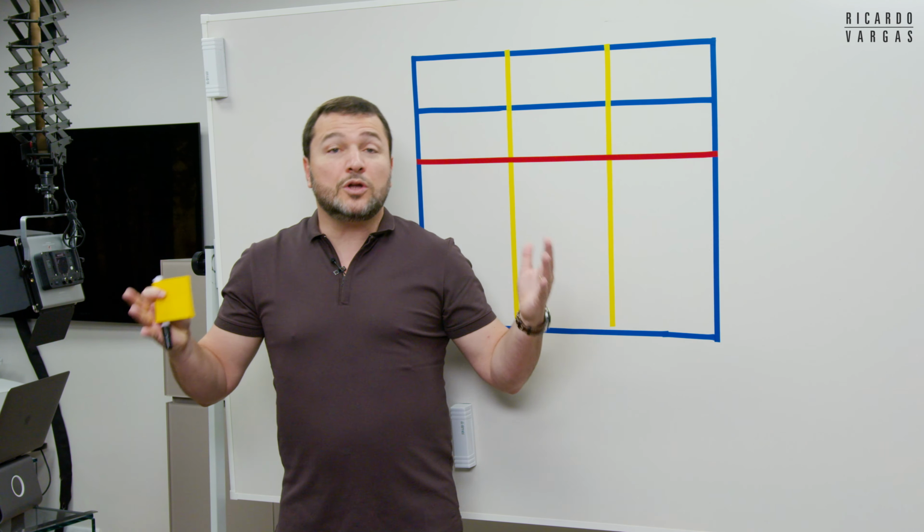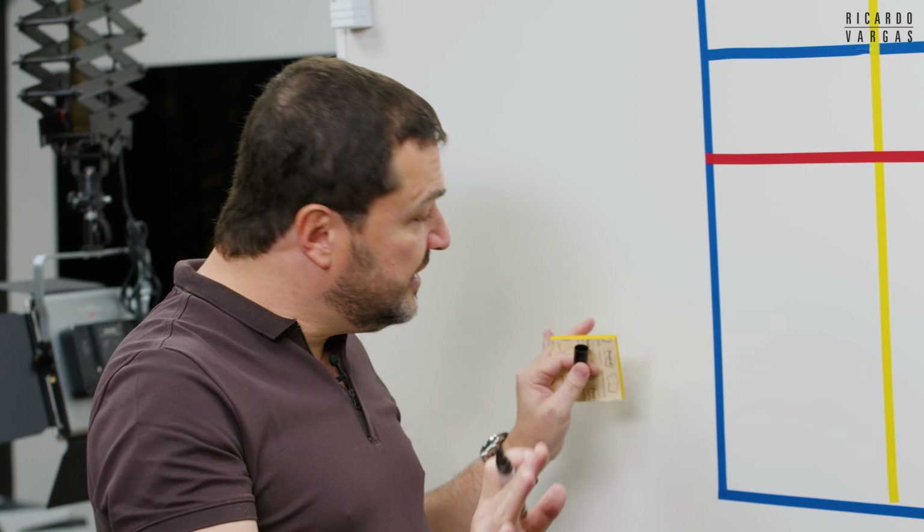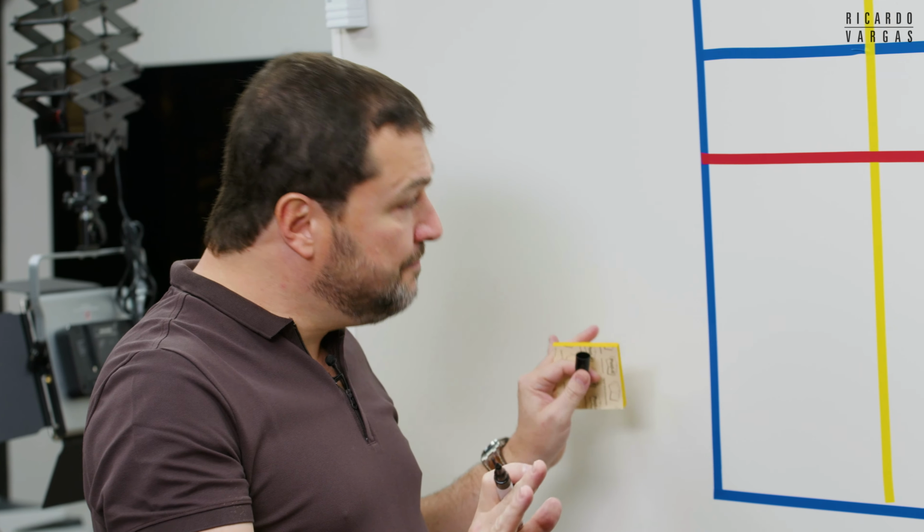And I'm not talking about Kanban only in technology. We see so many videos talking about the use of Kanban in IT, but I want to talk in a very generic way. And how do we control this? So let's start trying to build a very simple Kanban board. The most simple Kanban has 3 columns: to do, doing, and done. Okay, this is the most simple.